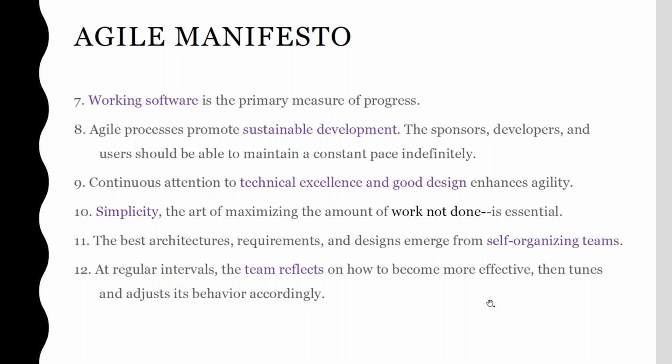In such cases, we have to maintain consistency. Once you fix your sprint size, say 4 weeks from the second or third sprint onwards, you have to maintain that consistency throughout the completion of the project. So the consistency should be maintained here.